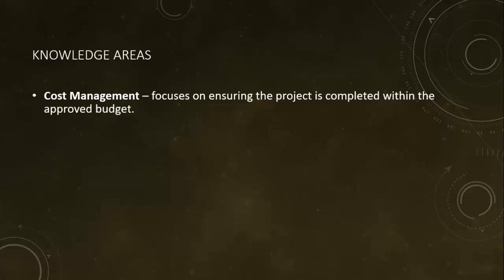We are currently in a global pandemic, which has affected how we get a lot of raw materials for a lot of things we do in this nation from China, and that has slowed things down. As a result, our costs in doing various things may have risen, either because we now need to expedite, we can't just wait on the natural shipping of things from China to us, we have to ask them to do it by a different means to get it here faster, and or we needed that raw material to do something with this one group and they've moved on and we need to reschedule them later. And so that may have moved things out, thus further increasing our costs.